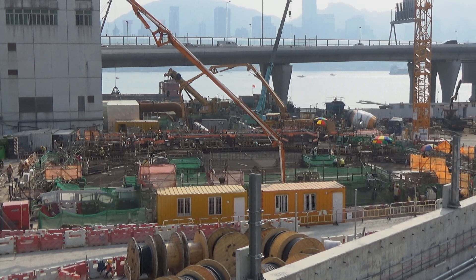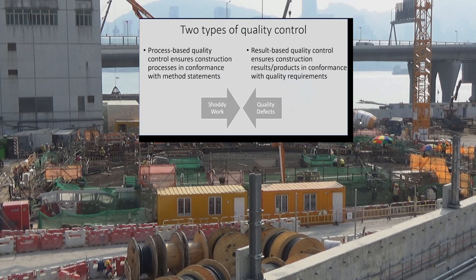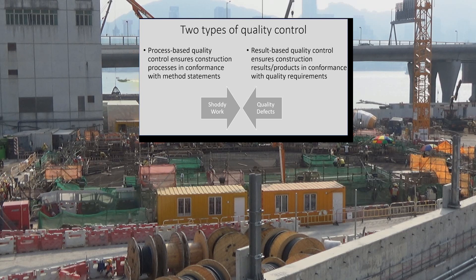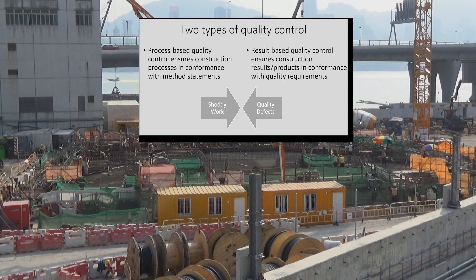Construction activities are discontinuous, dispersed, diverse, and distinct. These characteristics can easily overwhelm quality inspectors when they need to pay daily visits to multiple sites. As a result, quality records are often inappropriate, and quality management appears to be post-event remedies.